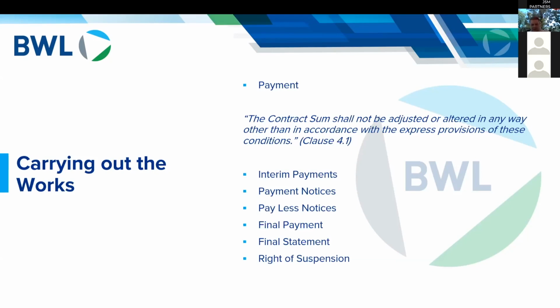Now, there are perhaps more risks on the developer side here than the contractor side. The reason I say that is because there are elements of the payment process where, if the developer or the employer doesn't do something by a given date, it's very easy for the contractor to make a claim, normally through the adjudication process, to be paid.